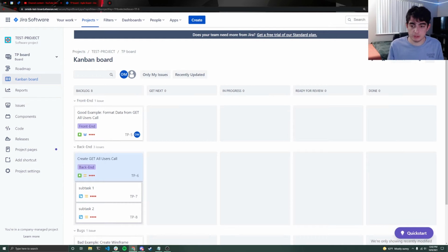I actually talked about story points earlier, and I'll talk about them again. But if a story's point value is greater than 5, you've probably done something wrong and you need to break the story apart. Because realistically, giving people big tasks is, as I mentioned, demotivating, and it also enforces something where one person could become the sole source of knowledge because they did a ton of work related to one task and no one else ever saw it. And so now they're the only person who really knows. They might have been demotivated and it could have taken them longer than we expected. And it was just never clearly conveyed exactly what that story needs in order to reach its end goal, so the developer might have to make some inferences along the way.